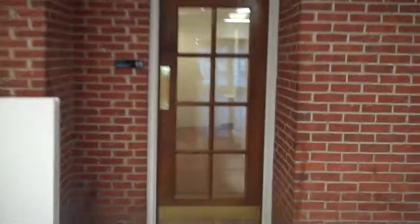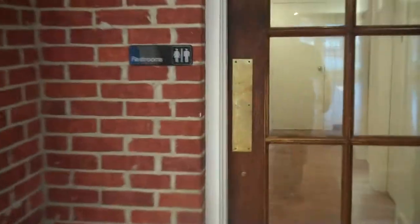Okay, I'm walking back towards the bathrooms. One of the bathrooms does not meet ADA, so the partitions have to be moved around, which will happen on Monday as well. So just a couple loose ends. That's in the women's room. This stall will have to be extended to encompass this whole area. We've removed that toilet and the partition is just modified so we can meet our ADA requirements. Everything else is okay. So this will be made into a unisex bathroom.